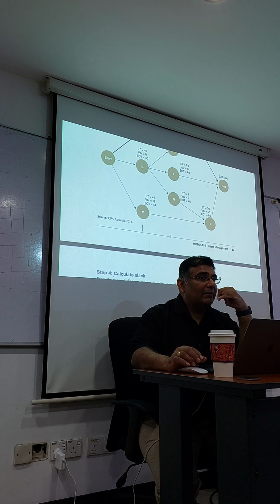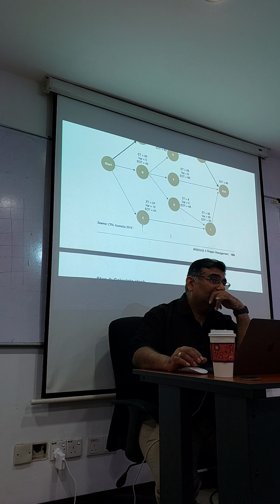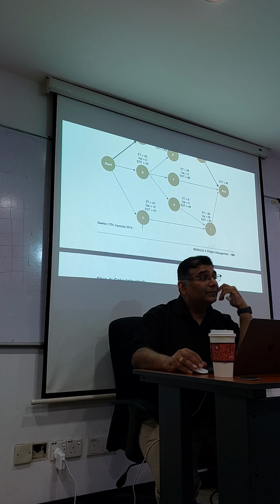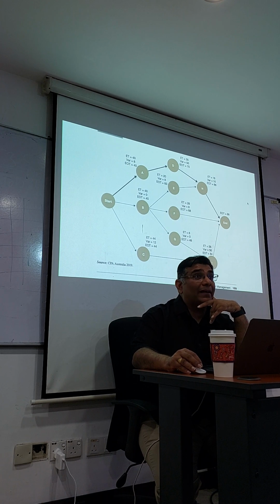Latest starting time. Are you okay? LST. Do you know how to get the latest starting time for F? Work backwards. So what is the latest starting time for activity I? 86 minus 36 is 50. Can you get 50? What's the latest starting time for H? 86 minus 16 is 70. It's going to be 70, which means, because this is on the critical path,